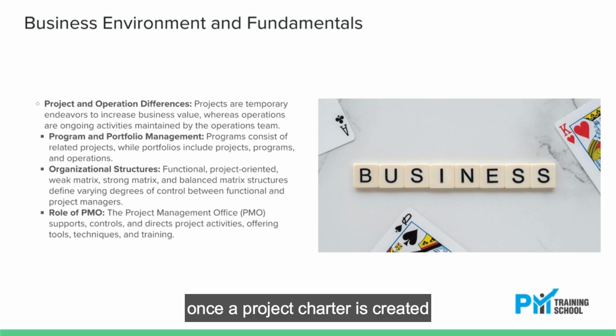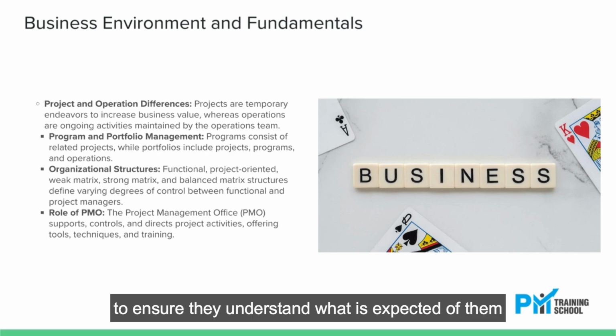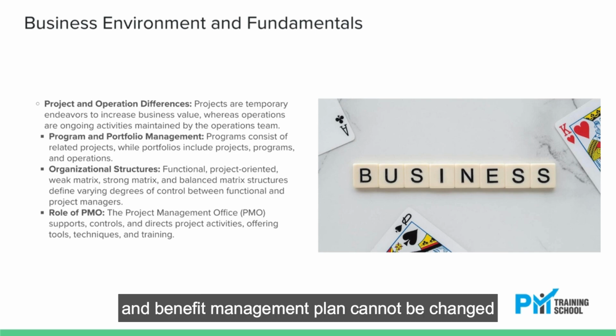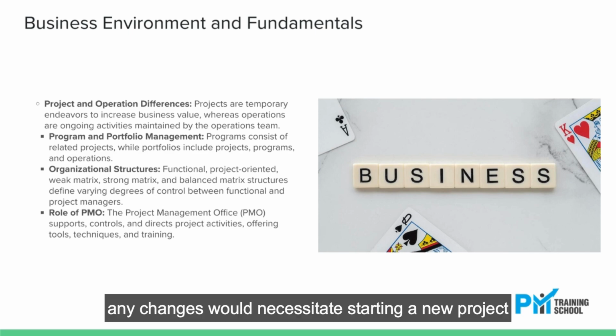Once a project charter is created, the first step is to review it and share it with key stakeholders to ensure they understand what is expected of them. Project charter, business case, and benefit management plan cannot be changed once approved. Any changes would necessitate starting a new project.